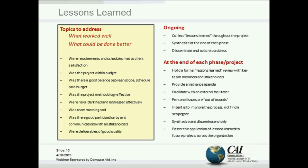At the end of every project — and if it's a large project, at the end of every phase — you should do a formal lessons learned session. That's where the closing-stage review comes in. It's formal: you have an agenda, and ideally an outside facilitator — not necessarily a consultant, but someone from another part of the organization who is good at facilitation — so that personal issues don't make people uncomfortable.